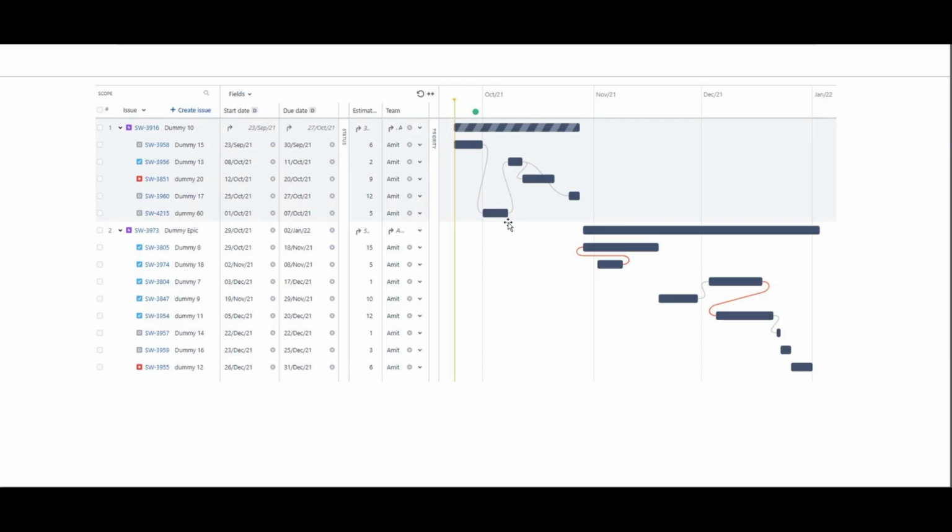If you look here, this user story has to be built, or this feature has to be built first, and this feature has to be built next. There is a dependency, and once this is built, this user story has to be built. If you see the dependencies, you will understand, and there is no dependency between these two. So yeah, there is a dependency because there is a link here. So this is how it works, and this user story took this long, from November 21st to January 22nd.